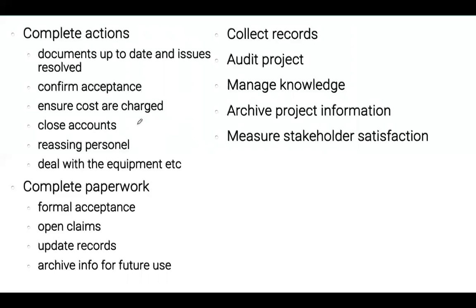The employees are just reabsorbed into their functional departments. You deal with the equipment, making sure that activities and resources that had been in use during the project work are not utilized anymore, are reassigned, are recycled, or are simply not a concern anymore for this particular project.